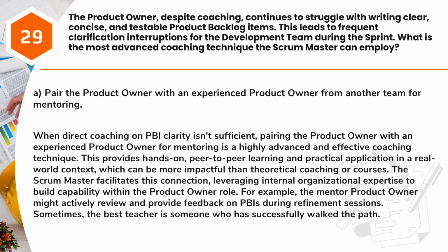This provides hands-on, peer-to-peer learning and practical application in a real-world context, which can be more impactful than theoretical coaching or courses. The Scrum Master facilitates this connection, leveraging internal organizational expertise to build capability within the product owner role. For example, the mentor product owner might actively review and provide feedback on PBIs during refinement sessions.